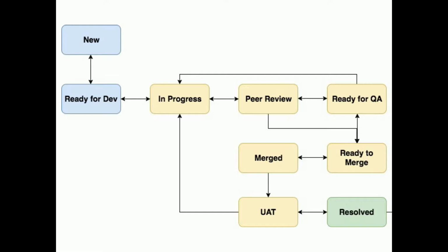It's a good opportunity for developers to learn if they might not know the approach that was taken, or a senior developer could review it and say, why didn't you change your approach a little bit? But every single process that we have is always going to have that review status. And from there, it depends. If it passed review, great, it's going to go to QA. If it didn't, we'll kick it back to in progress.